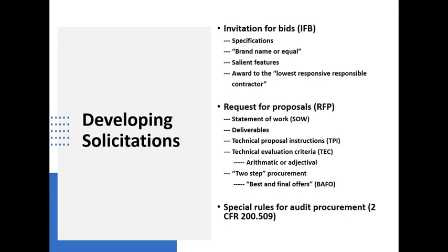So the idea is if you're going to identify brand name, you have to identify the salient features that the brand name item has so that other brands can offer their comparable goods. Again, the award goes to the lowest responsive responsible contractor.